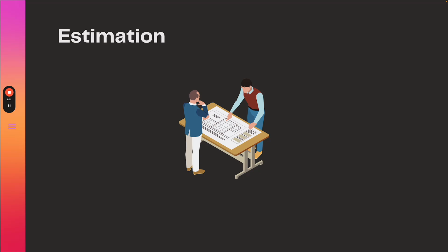So for example, previously you may have found implementing a security model really difficult. Take that into consideration when you estimate the time that you're going to be spending on building and implementing that security model. If you have a team involved, get them involved in the estimation as well. Get input from the development team members who will be working on the project, as they will have a better understanding sometimes of the effort required for various tasks.